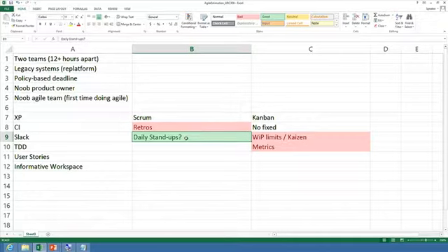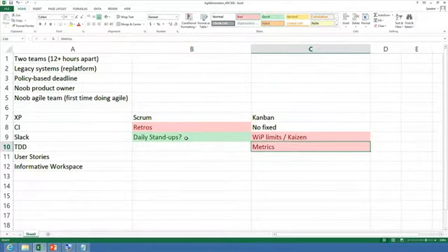I actually would argue that you'd want to do both. So you'd want to have a daily stand-up that does the Scrum values and the Kanban values. Because with the new people on the team, you constantly want to be checking in on a daily basis, saying just, how's the process going? Because you have the work in progress limits. So I would say you'd have a daily stand-up here and a daily stand-up here. One from both. And that's one way. We put in retrospectives, right? The retrospectives go into the Kaizen event.